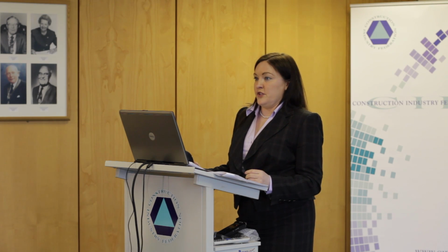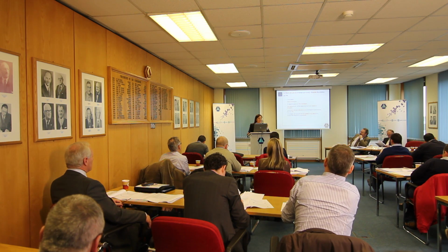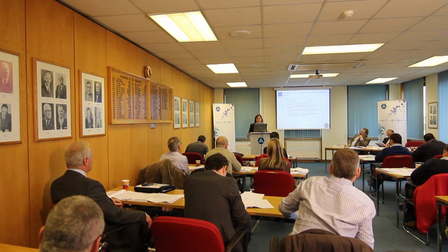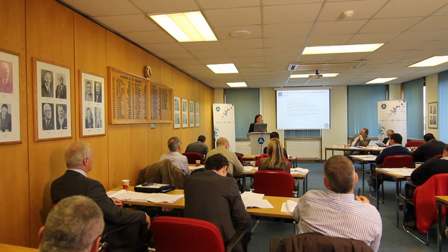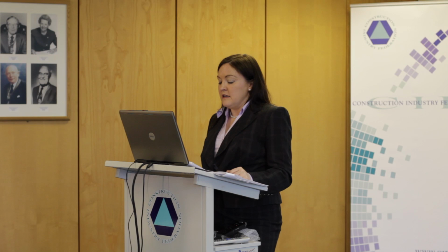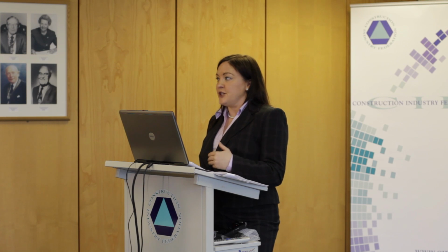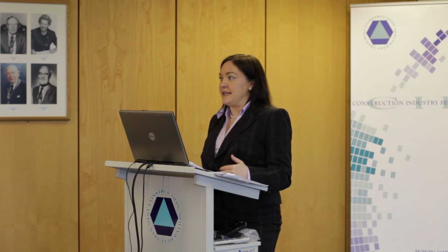So, no magic there. I'll tell you what does go wrong is that nobody makes a claim for it. An EOR makes an instruction. A very good EOR will say, I'm making an instruction and I'm allowing you such and such days or such and such a price adjustment. Mostly they don't. So you're going to get your instruction. The contractor goes, okay, fine, I was working off an instruction, so that's fine, I can proceed. You as the contractor need to get a letter in saying what you need for that instruction. So request an instruction, request your price adjustment, request your extension of time. Whatever you need for that, get your claim in, telling the EOR that that's what you need.